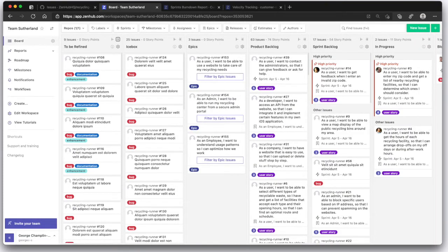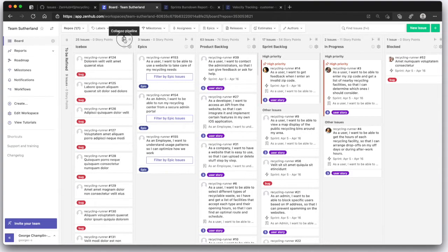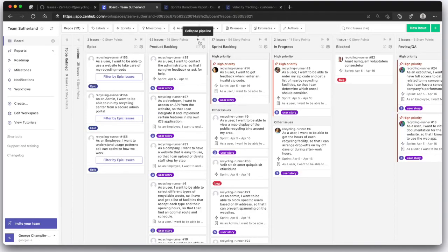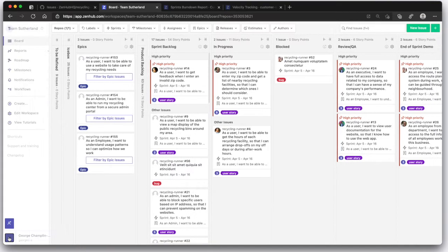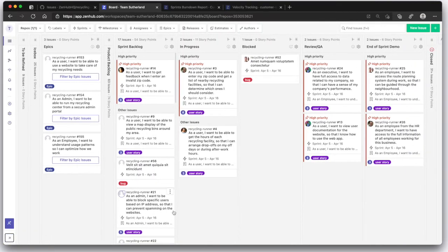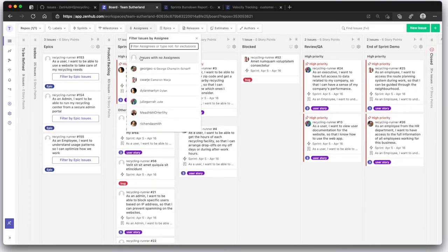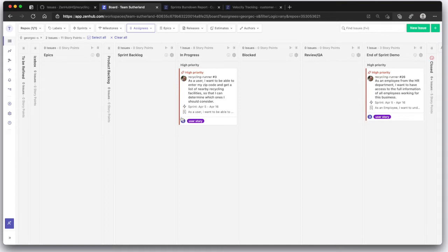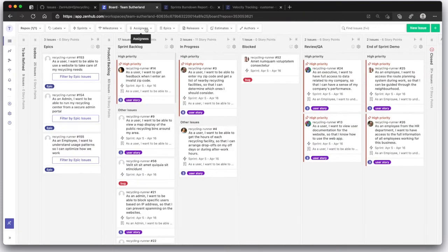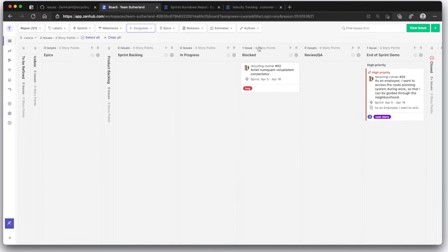Running your daily Scrum, oh it's easy using Zenhub. Let's collapse the pipelines to focus the team, we'll collapse the sidebar so we can see more of the board, and now we'll filter by assignee so that we can say yesterday I wrapped up number 26 and it's ready for an end of sprint demo, today I'm working on number three, I am not blocked, and go on to the next.